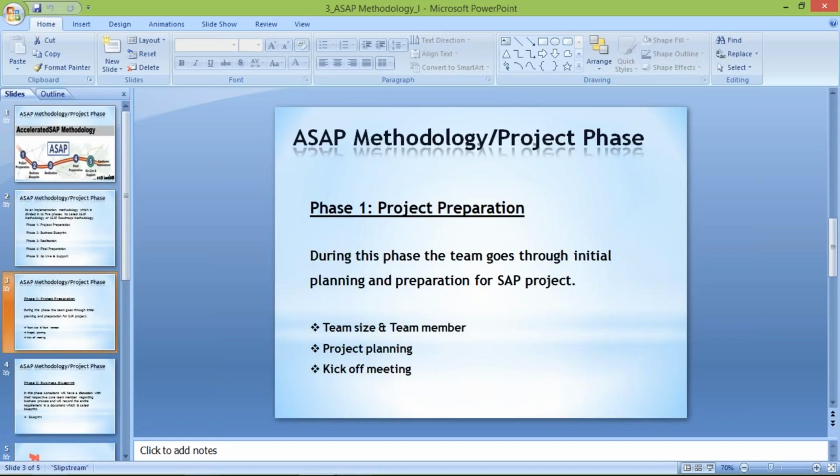So the next question is, what about this deadline? When is it going to start? When will the countdown begin? Because they have said eight months, but when is the deadline going to start? So the answer is, once the project manager reaches the client location, the client is going to start their countdown. In the sense, the deadline will start exactly from there. So here the project is assigned to a project manager, in the sense that Wipro Technology has assigned this project to a project manager, and then the project manager reaches the client location. Now the countdown has begun, in the sense that the deadline has started.